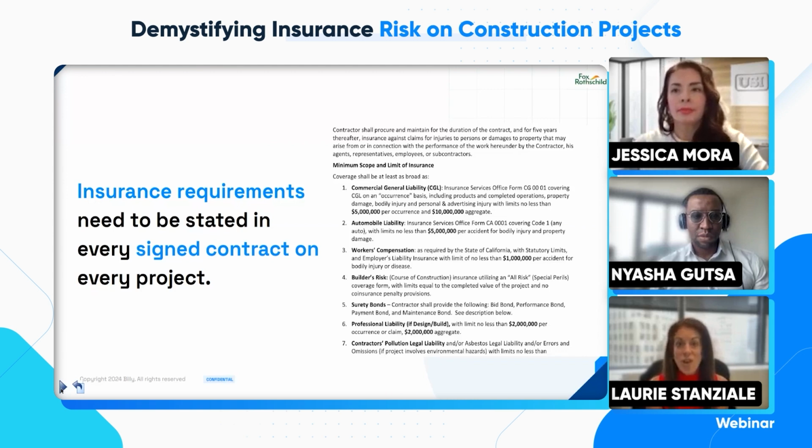Because first of all, as we know, those of you who may be attorneys on the call, or even your owner, your contractor, whoever you may be, sometimes exhibits don't get attached. They get lost. The agreement doesn't get put together and compiled properly. You don't want to just be referring to a separate document. It's fine to attach the insurance to the contract, but you want the insurance requirements expressly stated in the contract so that everyone is clear that this is a contractual requirement. So that's very important. And again, having the proper insurance listed is what's important.